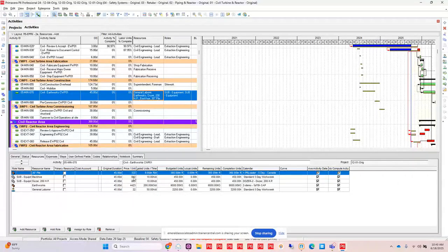That also is put in your dictionary that you've built. And that dictionary can be really flexible on that. You can have different units and prices for like day shift versus night shift. Maybe you have a price change in different periods of time, maybe per year. You can depict that so that it's automatically going to calculate that out for each one of your resources when you're applying them to these activities.